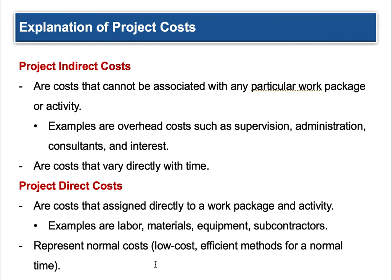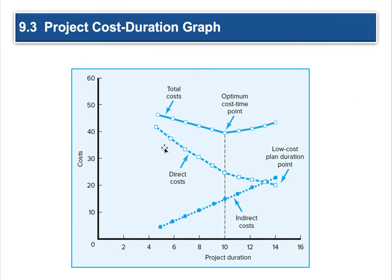Project direct costs are costs assigned directly to a work package and activity. Examples are labor, materials, equipment, and subcontractors. This represents normal costs — low-cost, efficient methods for a normal period of time. So if they're efficient costs, look what they do over time: they start to go down. You get more efficient as you do this project. Early on you don't understand the project, so you put a lot of time in. But as you do it more, you figure it out and get more productive, and your costs go down.